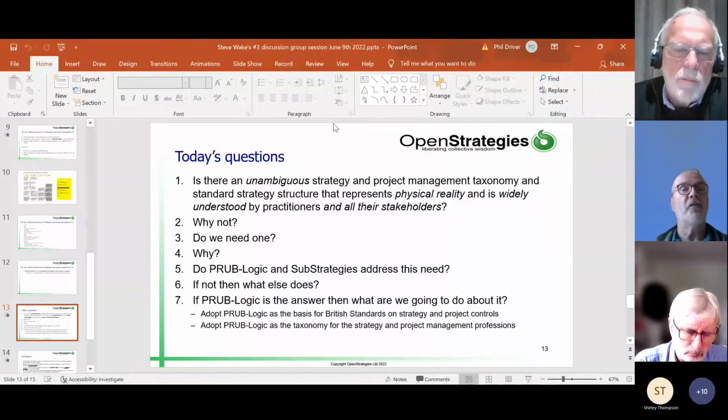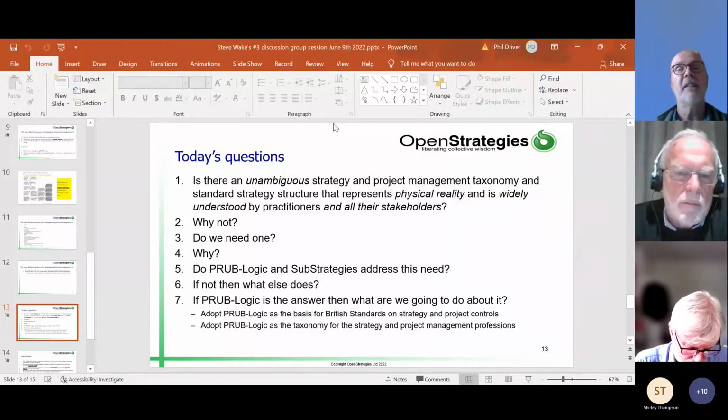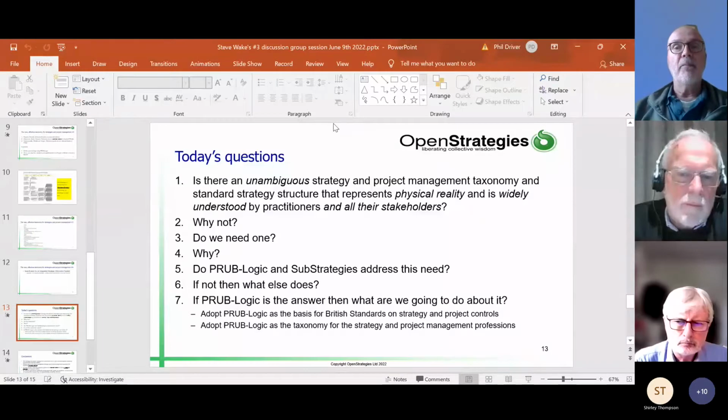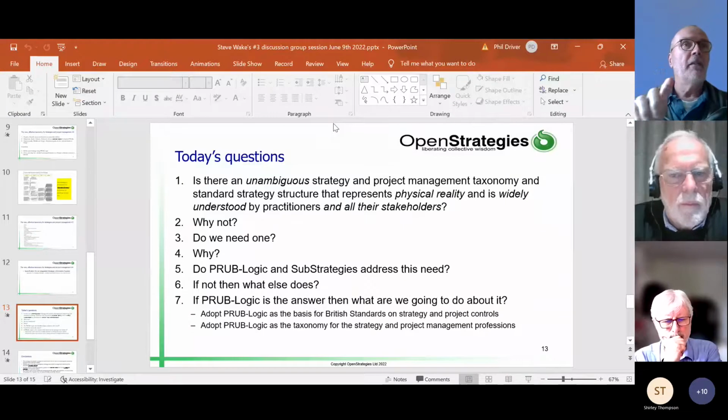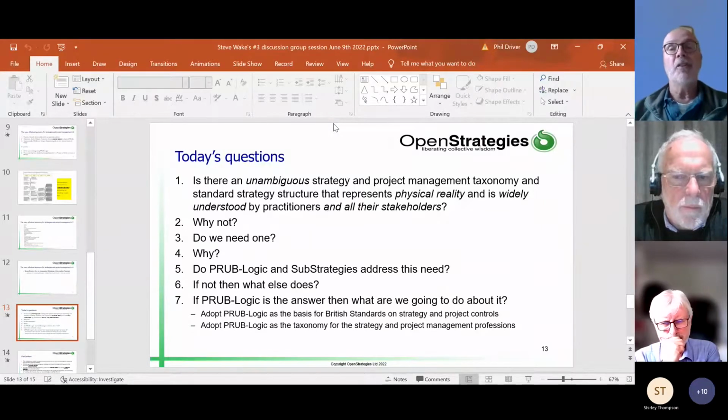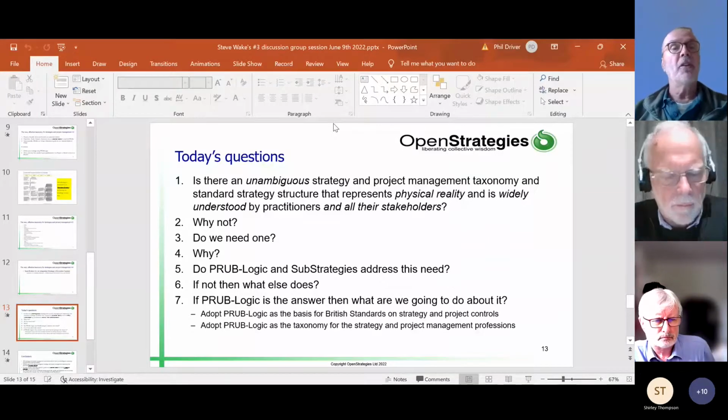Yeah, I'm sure there's sequencing that needs to be fitted in there. But at the end of the day, if you don't get the hierarchy of goals aligned and contributing effectively, and if you don't do that quickly, projects end up taking much longer than they otherwise would, and in fact you probably end up with significantly more change as well as a longer implementation time, and more rework.